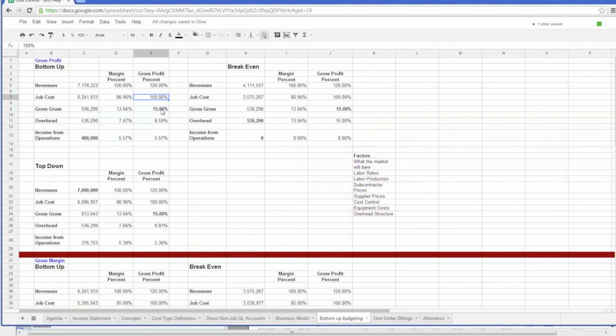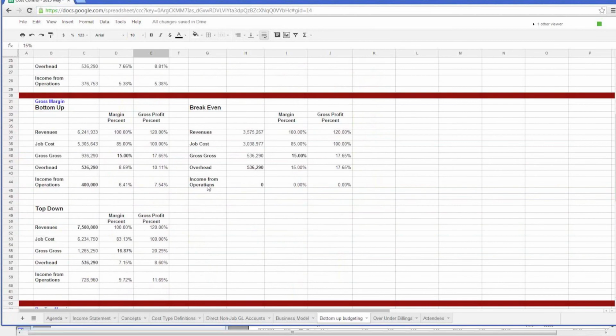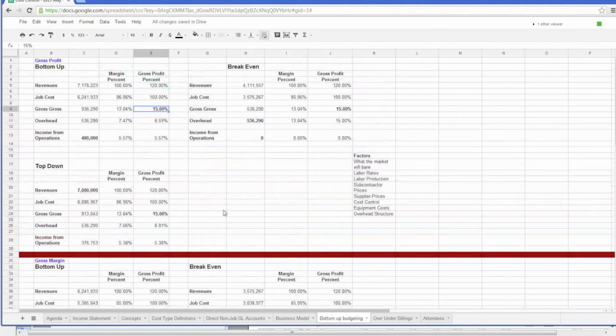Yeah. So if you look at your gross profit percentage, 15% of your cost is going to equal this number, 13% of your revenue. That's the margin. Okay. I'm just making sure I got your definition versus how it's kind of stated around here. Okay, good.